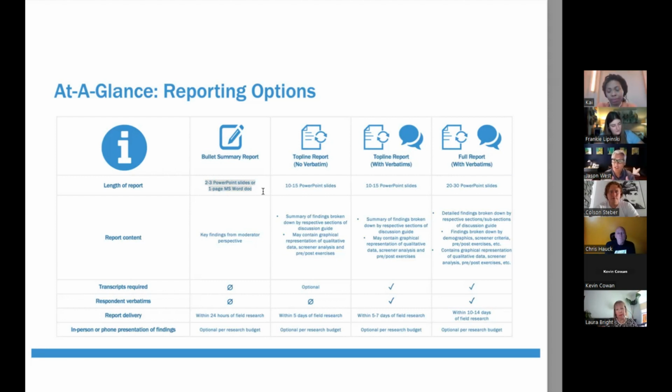So when clients say, oh, but we only work in Keynote, that's Apple, I know I'm going to have to add additional time and potentially budget to those projects because if you need it in Keynote, that's not my expertise. I don't work in that day to day, but it's important they hear from me what type of deliverable I'm providing so that they know what to expect, because uploading a PowerPoint into Google Slides, things get a little wonky on visual, things bleed off the slides, etc.